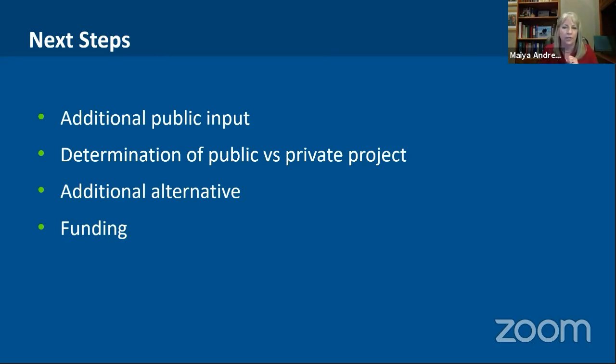The other thing I don't want to forget is the sewer district. Valley View Sewer District does want to do improvements out here and put in sewer. They reached out to me. Between the two of us, if we partner together, we're going to be more eligible for grants. And so we have said, yes, we will apply for grants with you, doing the sewer and stormwater simultaneously. So they're already willing to work with us, and I'm sure that's desired by both parties.